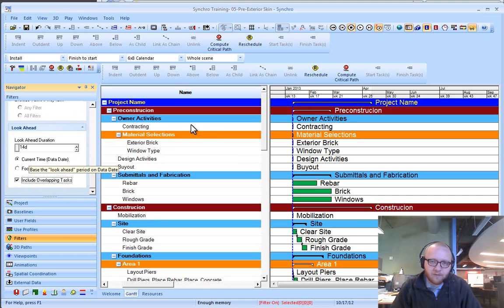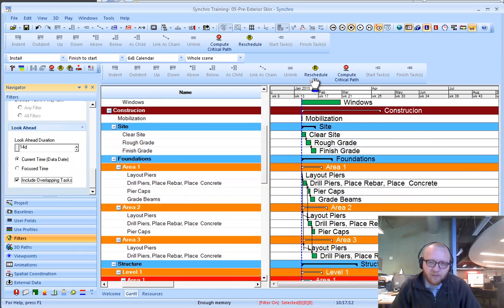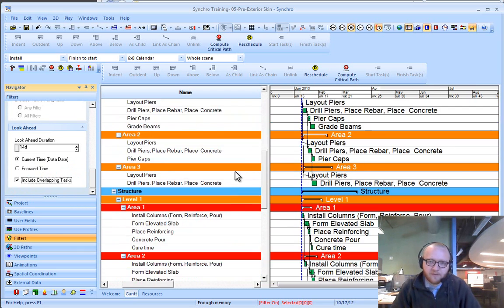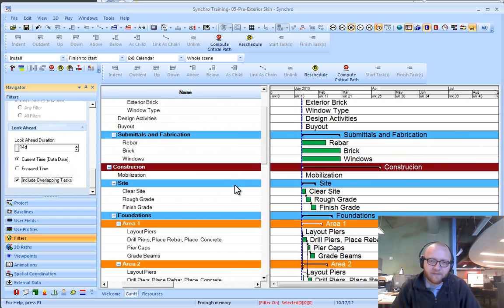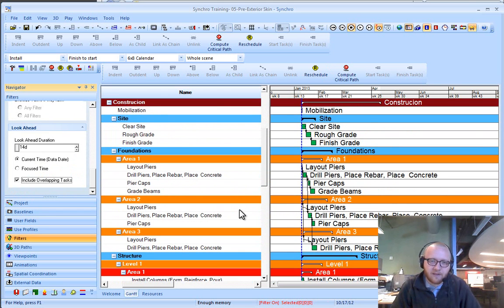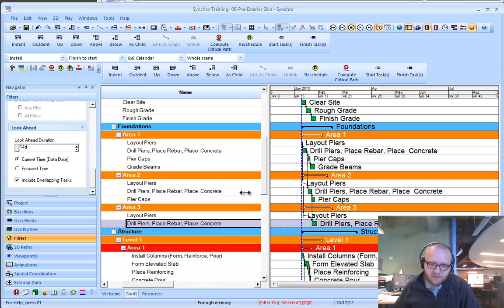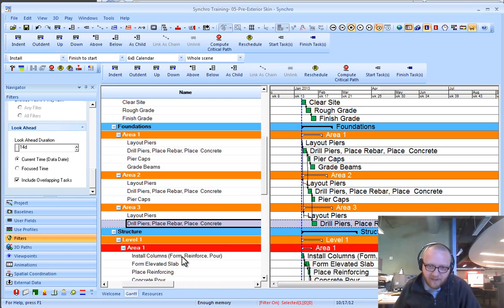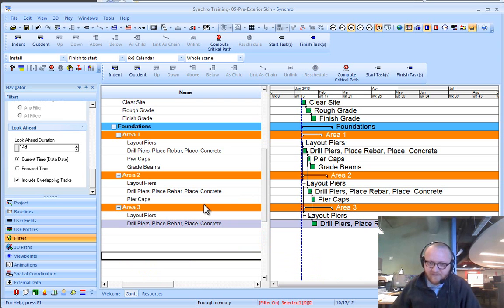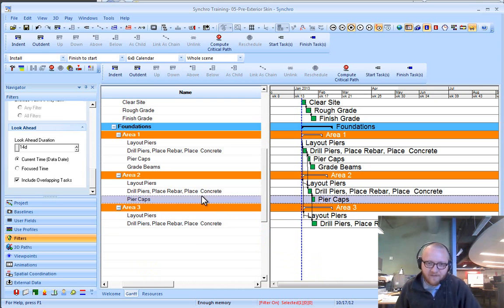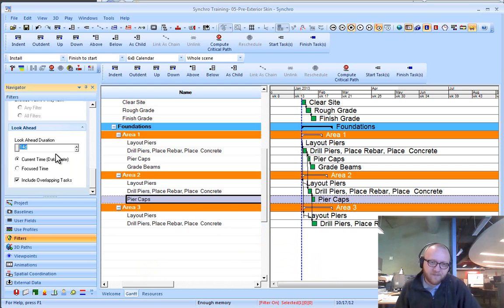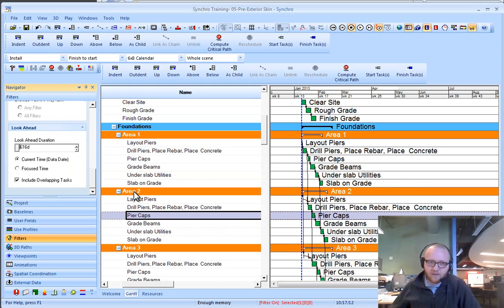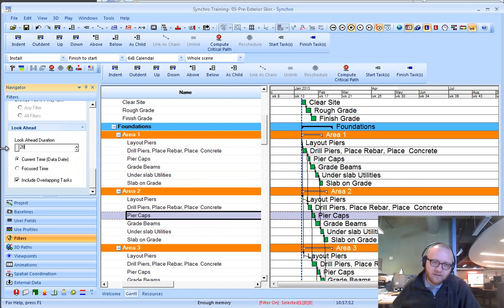Our blue line is our day-to-date. What I'm going to do is filter ahead by a lookahead date. You'll see that this was a training schedule. I don't have all the activities linked together right now, so as I put that one forward in time, it goes away. I need to be looking ahead 28 days because it's a calendar day duration.